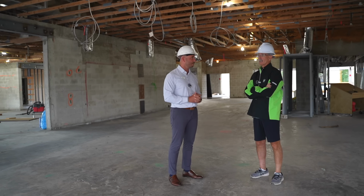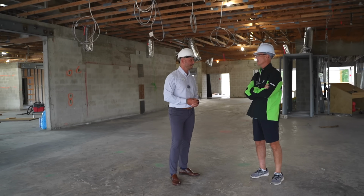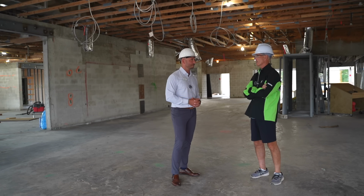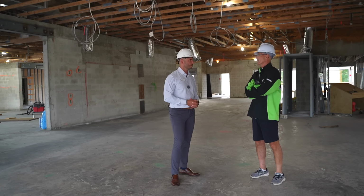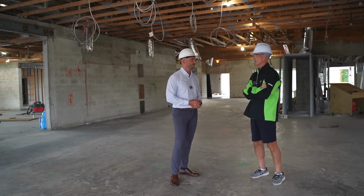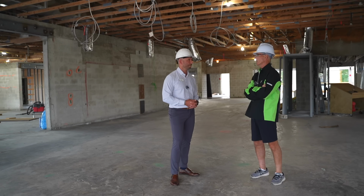Mike, am I missing anything? Did we capture it all? Financially, we're in good shape. I know we've been reporting monthly to the board. We have a contingency just under $500,000. So strong. We're expecting to do some of the upgrades that are on our list, things that we had to pare out for our value engineering. You and I are looking at some roll down screens with hurricane rating for the pool cafe. We've got the old bathrooms that we want to do some things to, and want to fix up the front of the building.